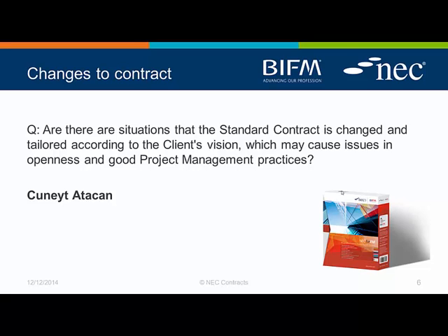These things are important to us. You don't need to build them into the terms and conditions. So my bottom line on it is keep any changes to an absolute minimum. If you have got things that you need to put in, try and put them into the specification rather than terms and conditions.